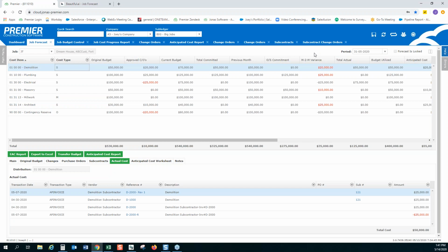But also it's important to make sure you're not making adjustments in the wrong period, right? It happens all the time. We're human. We make mistakes. Let's say you meant to add in a transaction in May, but you were working on April before, and so the screen pulls up that you're in the April period. Well, guess what? If you lock the forecast, it prevents you from making adjustments to the anticipated costs in that period. So we've got it streamlined from start to finish to make sure there's the level of controls in place, and the streamlined workflow for you guys to find the information and then act on it. And so that is, in a nutshell...